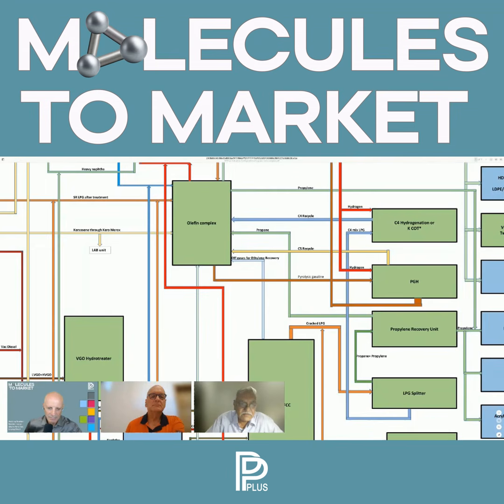They are in the decision making process. They have seen the proposal from the beginning. They have seen the estimates. They have seen the viability. They have looked into the strategy of project evacuation. They have looked into the implication of what is going to come by way of raw materials from outside. So everything which is there. Plus, they have also looked into what clearances they have to give. In India, if I set up a refinery or a petrochemical complex, I think there are 80 plus kinds of clearances which are required, which are all state and federal.